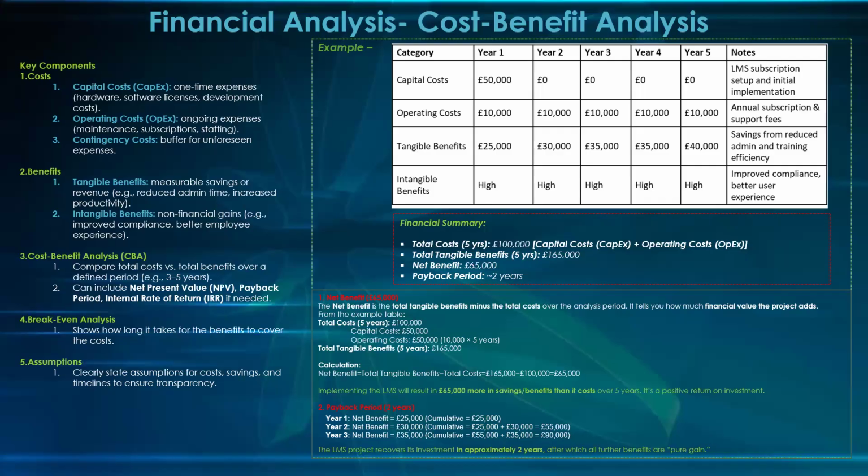Operating cost. When this is operating cost, that means even if you invested 50,000 capital, and this thing is not able to generate money, you still have to pay this 10,000, which is the annual subscription, because you don't pay those other subscriptions. Operations cost. You see where you're getting it wrong now. I've understood now, sir. Operations cost is not a project cost. Yeah, it's embedded in the company.